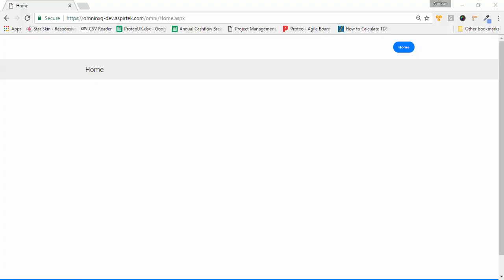The scheduled rates functionality in Omni lets users define rates for specific scopes and activities. So this way, let's say you have a scope for concrete, you can define a special rate for that concrete, including a rate analysis. This way, when you use that scope in your project plan, then the rate is carried forward and it speeds up your estimation process.